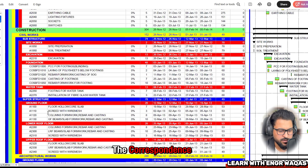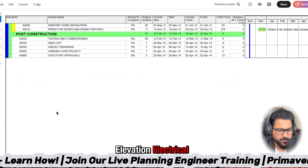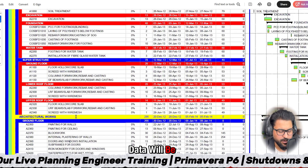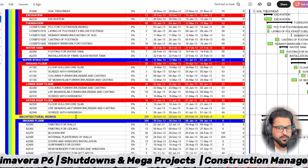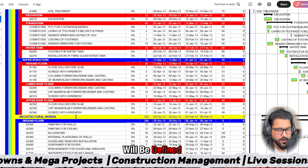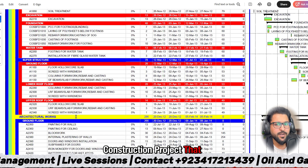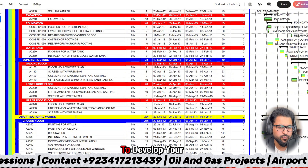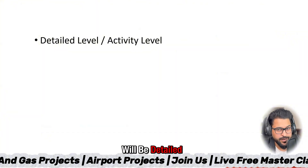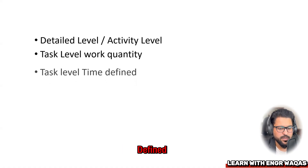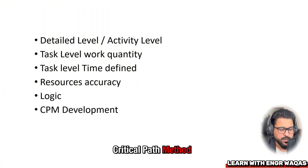All bars show correspondence across lower roof floors, architectural floors, elevations, MEP work — electrical and mechanical — and then post-construction. All that data is first structured in an Excel sheet with different levels compiled, then loaded into Primavera P6 where logic is defined and resources and man-hours with durations are assigned. That is how the villa construction schedule is developed.